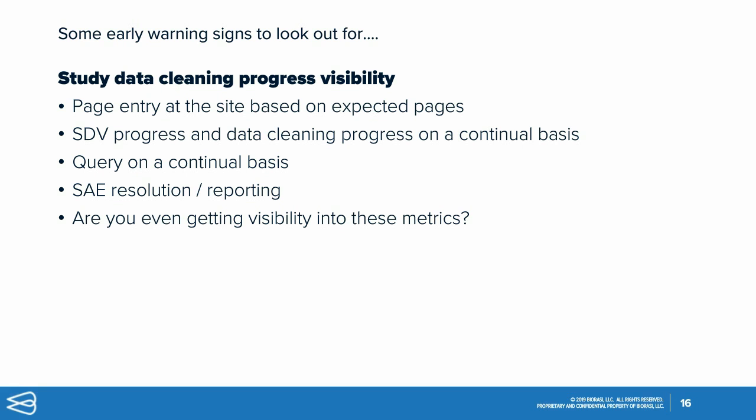And if the monitors aren't out there getting to the data, it's just not something that you can turn around on a dime at the end of the study and get all the data monitored. That's going to take time, and it's going to take a lot of money too. So making sure that SDV progress is going on. And if there's a big lag in SDV and a lot of pages out there that aren't SDV'd, that's a really early indicator that something's not right.